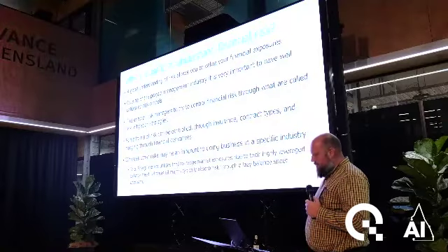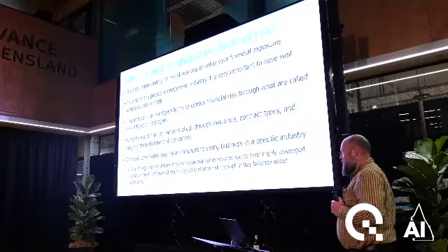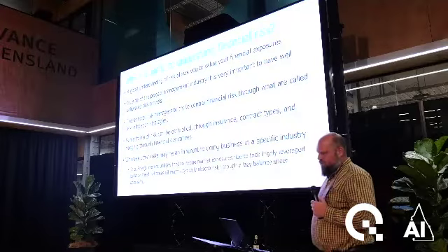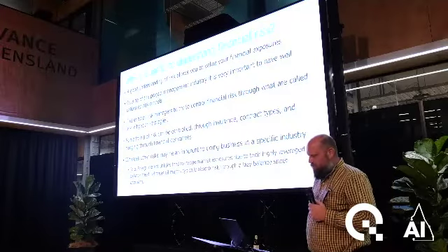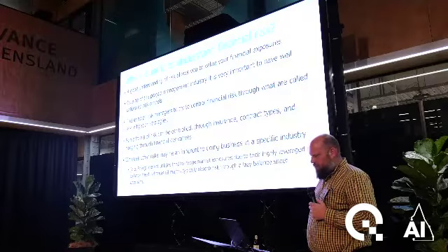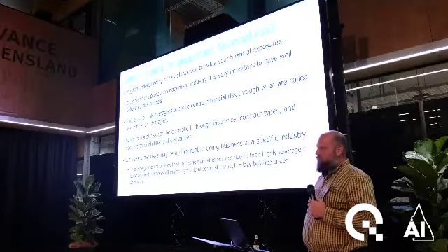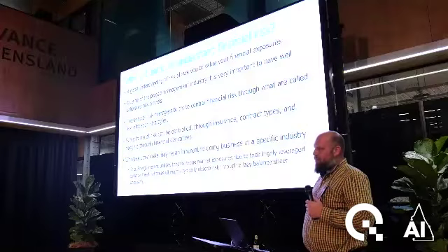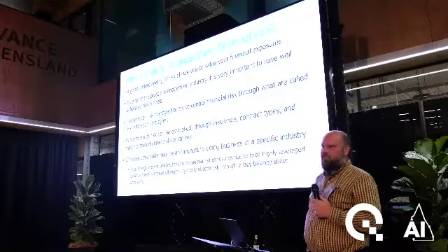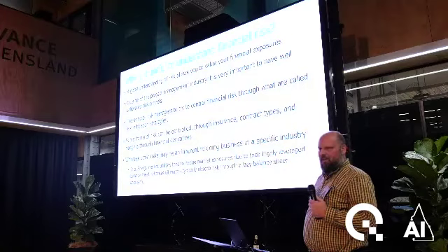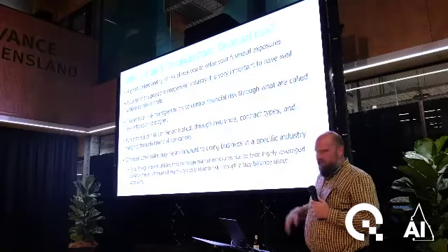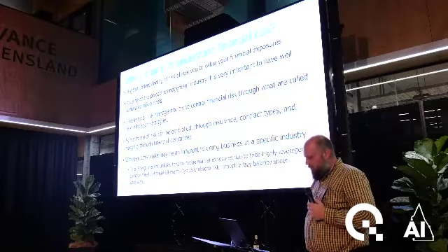Another thing is that some forms of risk can be controlled. For example, if you have some financial exposure to a commodity, you may be able to hedge it or use some insurance. Or if you learn about a risk that other people don't know about, you could change your contracting style. So you may be able to pass that risk onto other people and actually reduce your exposure to those kinds of outcomes.